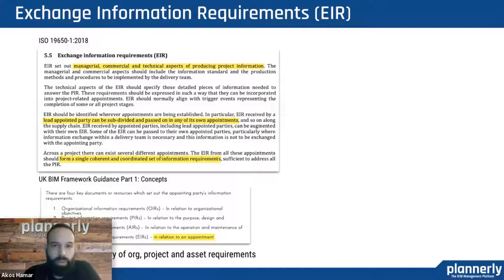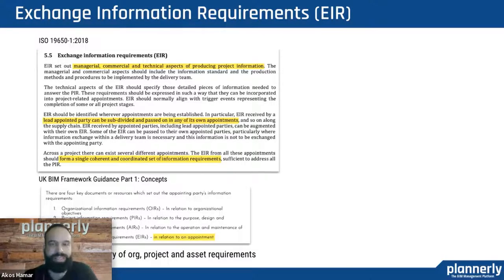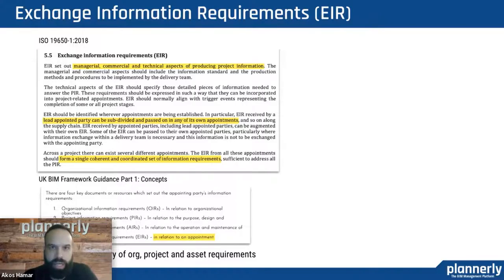When it comes to exchange information requirements, that's the combination of the previously mentioned organizational, asset, and project information requirements. This is really a contractual document where the appointing party sends it out to potential project participants to tender on, and they return their way of approaching and executing the project. We do have a template for that. But in a perfect world, you might want to use your existing documents, or use the OIR, AIR, and PIR documents we are providing and assemble your project-specific EIR in the application.